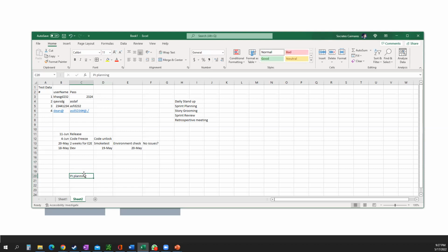You do your PA planning, say for the next, if it is on a quarterly basis, then you have 4 PA plannings, which happens, say, in January, and then in April, and then in June or July, and then in August or September, and so on and so forth until the end of the year. So what that means is that in January, your PA planning is going to determine the work that you're going to be doing for the next 3 months.